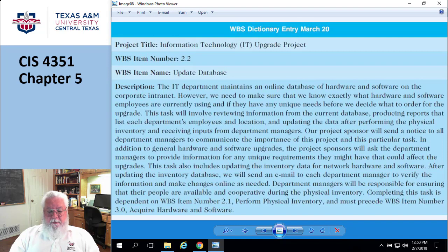Okay. It also is validating the scope, where you came up and said, okay, this new requirement doesn't seem to be approved anywhere. Where did you guys get this? Or here is the approval process for getting this change. Because you don't want to come in and say, well, our laptop weighs 8 pounds now. And you go, whoa. Who approved that change? And they all look around and go, well, I don't know. Right? Okay, cool. So the next one is on page 207, which is controlling the scope.